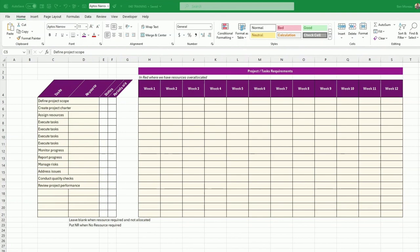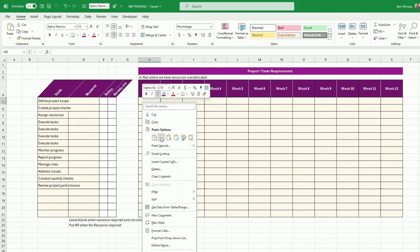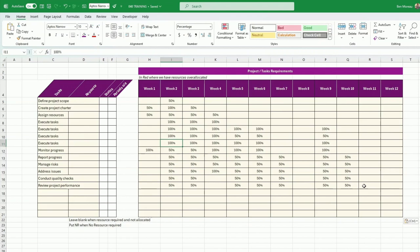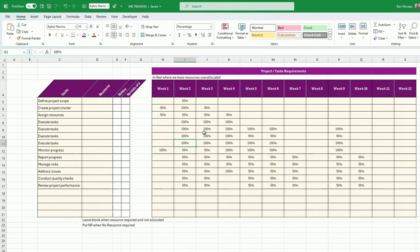On this tab I'm going to input some tasks and some random allocation — more towards the beginning and progressively less as the project advances. Your starting point is a project with requirements per resource: if you need two resources for one task, you duplicate the task. You stipulate 50% or 100% of a resource as needed, and when you don't need a resource for a given week you just leave the cell empty.